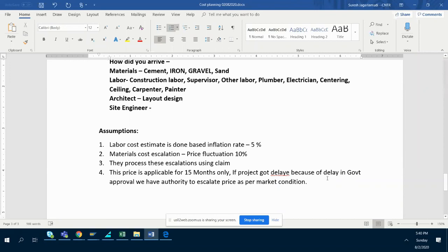So tell me, what is the meaning of this? Nothing but that they have a right to increase the price. Simple as that. Increase the price as per market conditions. Even in the Polavaram case, they would have given this timeline. Government won't tell everything, isn't it? They will tell only the 700 crores that they could save. On the tendering you can write anything. Even I can give 1,000 crores less in pricing. But I will put this clause: if the government is not able to give proper authorization within 1 year, then my price escalation is going to be based on my market condition.